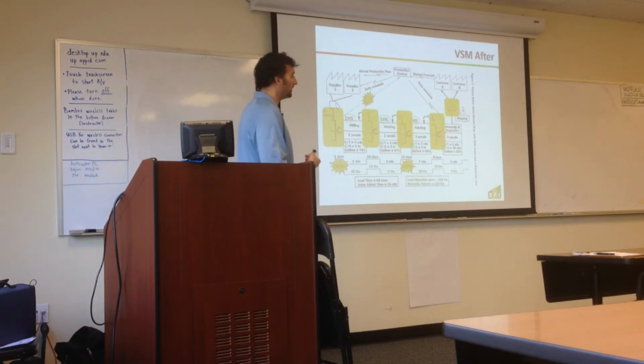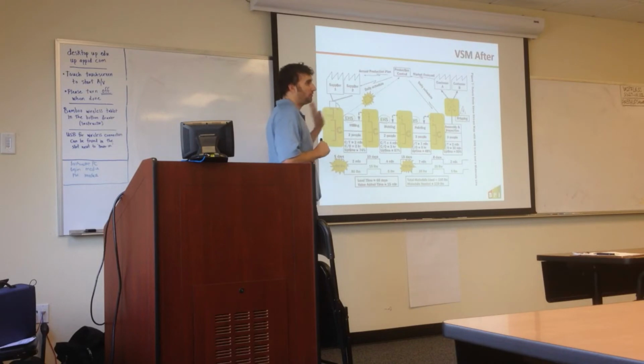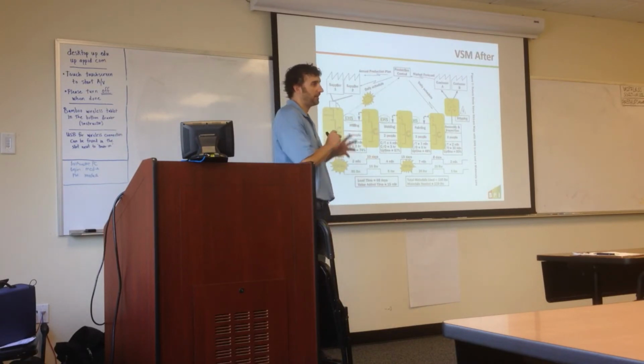And usually we put in another step before that. It's called an ideal state. And that's intended to break people out of their current line of thinking. Because a lot of people get very limited in their future state because they know they're constrained by today's current process. So they say, well, we can't change that. Our system won't allow that. So we got to break people out of that mindset first, because then you just get incremental improvements to future state.